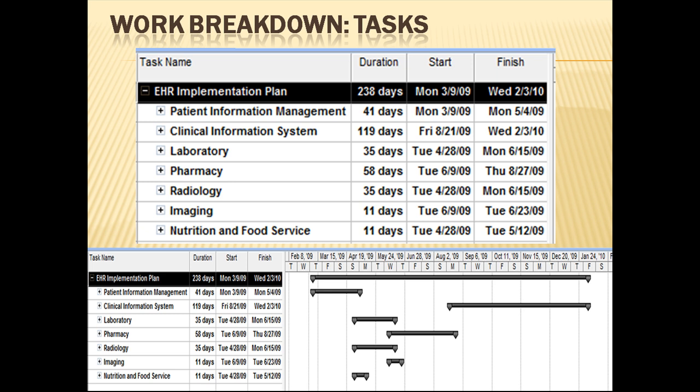The table on the top of this slide illustrates the seven different component tasks required for implementation of the electronic health record. These tasks are patient information management, clinical information system, laboratory, pharmacy, radiology, imaging, and nutrition and food service. The assumptions used are that even though the hospital is open for patient care seven days a week, the electronic health record can only be implemented during the work week of Monday through Friday. Configuration of different tasks can begin simultaneously unless specified otherwise. On the bottom, this same table is positioned next to the Gantt chart created by Microsoft Project, providing a visual representation of when each task can begin implementation.